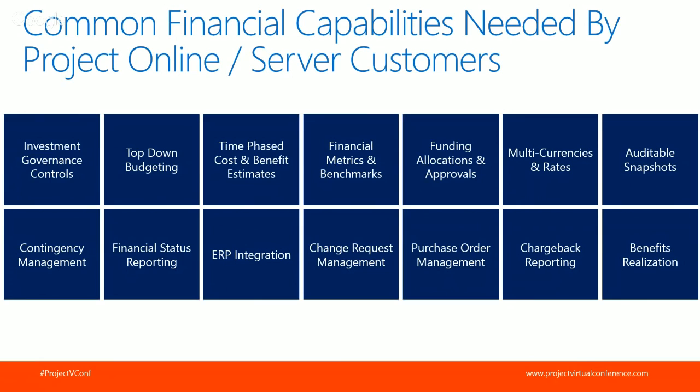So there's a concept that I see a lot, which I now nickname financial amplification. That's the concept that at the early stages of the project's life in the business case, maybe only high-level financial information is required. But the deeper you get into the planning process and execution of that initiative, more and more financial information is required. So how do you systematically go from a yearly granularity into a monthly granularity and an explosion of financial information and automatically spread information at those lower granularities? So time phase cost estimating at varying levels of granularities is important.